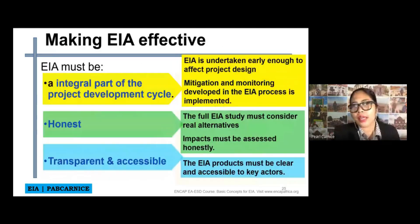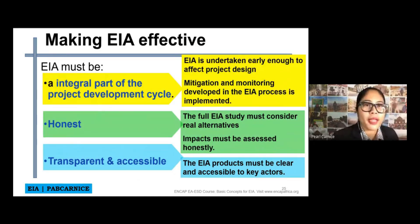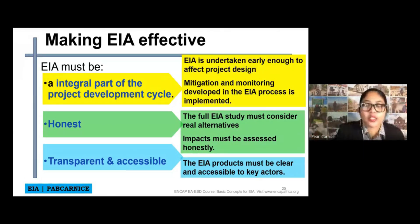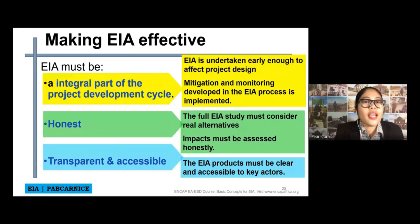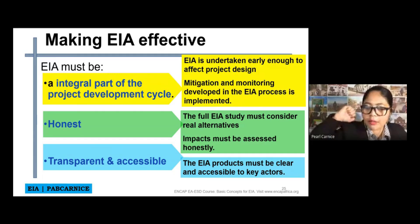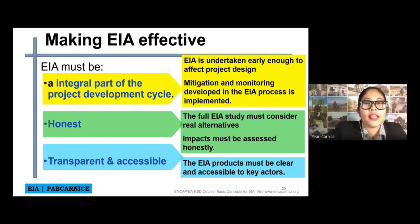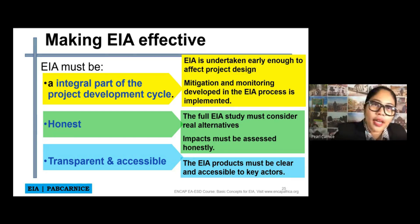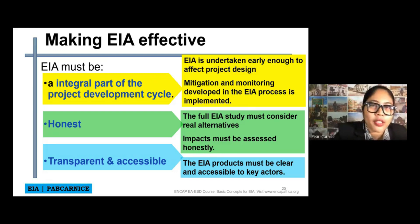So how can we make our EIA effective? The EIA must be an integral part of the project development cycle. The EIA should not end when the project or activity is already conducted and the project is already built. The EIA must cover the project development cycle — the pre-construction phase, construction phase, post-construction phase, and the abandonment phase. The EIA should be undertaken early enough to affect the project design, and the mitigation and monitoring developed in the EIA process must be implemented.